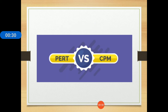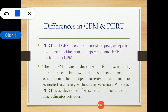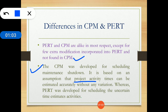We will understand PERT by looking at the differences between CPM and PERT. PERT and CPM are alike in most respects except for a few extra modifications incorporated into PERT that are not found in CPM. CPM was developed for scheduling maintenance shutdowns and is based on the assumption that project activity times can be estimated accurately without any variation.